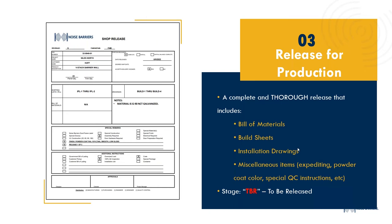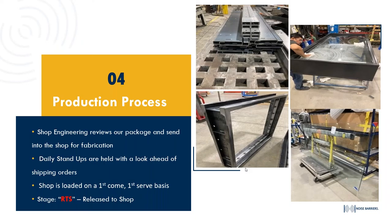Once everything is approved and all boxes are checked, the drafter has submitted drawings meeting all requirements. The order then moves into the order release function: a bill of materials is created, along with build sheets for the shop, installation drawings, and miscellaneous item details. This includes any expediting if applicable, powder coat color selection — whether primer or powder coated — and any special QC instructions, such as for one-way mirror glass or other customer-specified requirements.